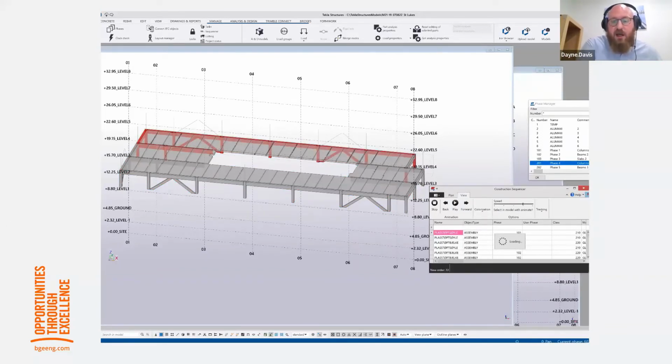So the carpenters at everyone's site knew exactly which element went first, which element went second, third, fourth, and so on and so forth. It really helped us to micromanage on site. It helped us to coordinate our transportation. So the factory in Germany knew which beams to press first. The CLT factory, both in Albury-Wodonga, XLam, and Cusp in northwest Tasmania, knew which elements to make first, second, third, and how to arrive on site. And this is why we're able to achieve that 50% reduction in time, because essentially it's putting together an IKEA set of parts. We've left nothing unthought about, which also meant that the builder can take away a lot of their contingencies, which was the case.